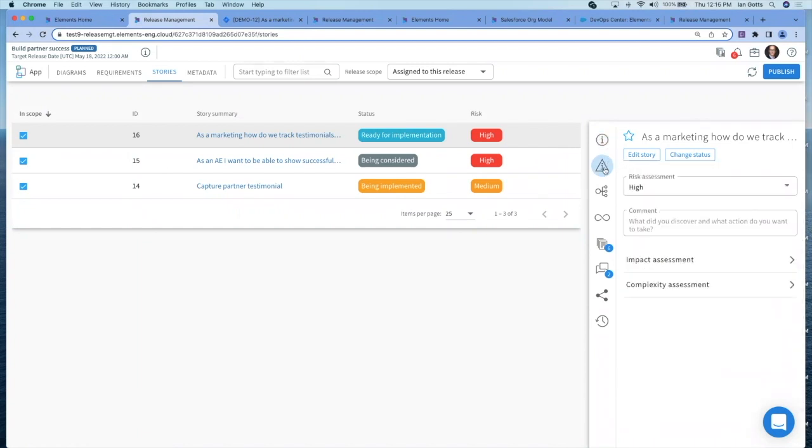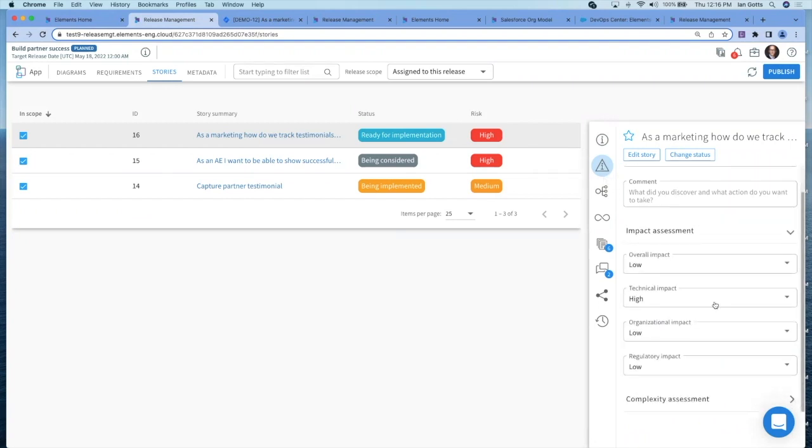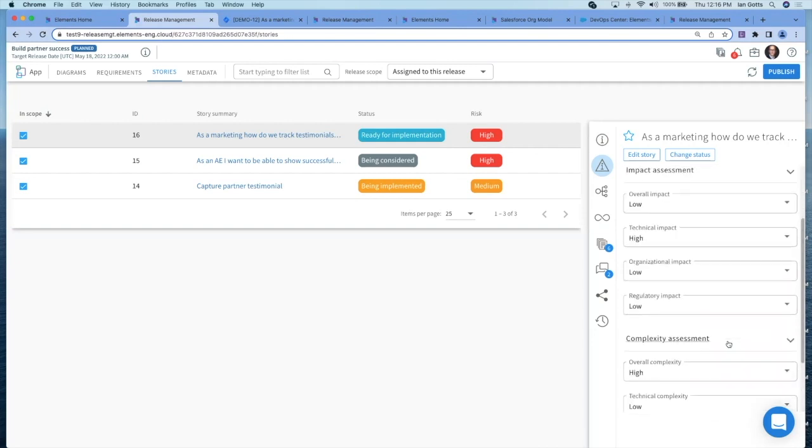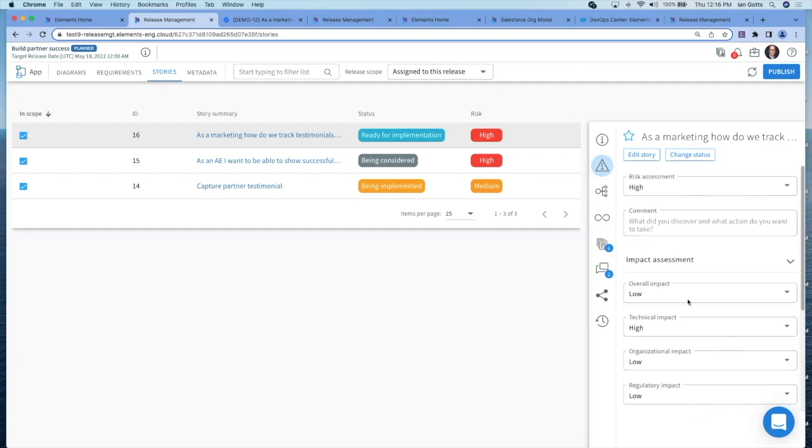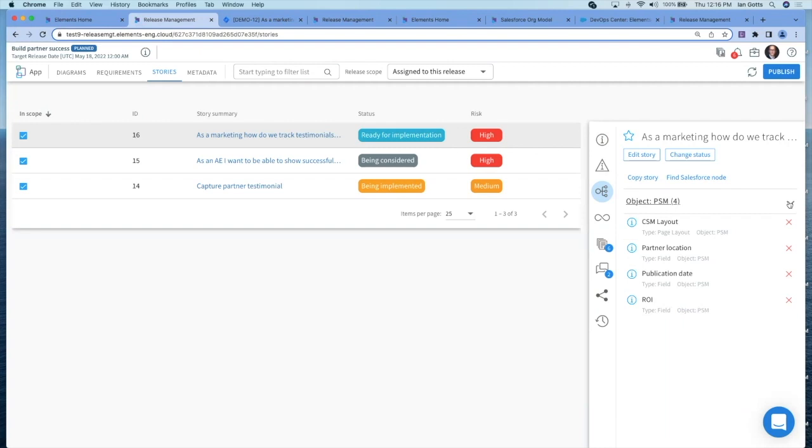The next one down is the risk of this user story. We've said it's high risk. We can look at an impact assessment: technical, organizational, regulatory, and a complexity assessment. The next item down is which metadata items do we believe are going to be changed or new items, proposed items that you could go and add here in this section. This is our business analysts talking to the end users. When it comes to development, they may identify other things that need to be changed.